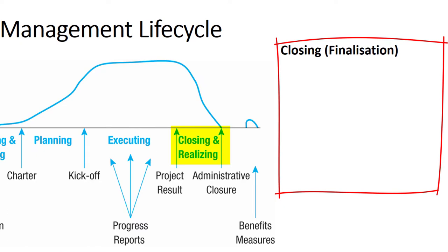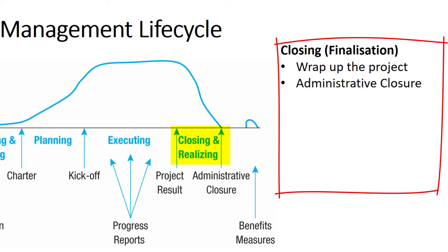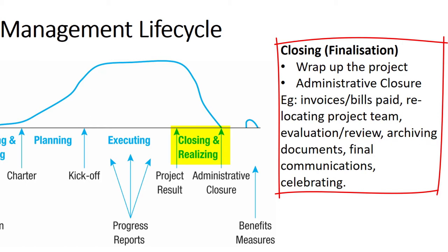This stage can also be called finalisation. Once the client has signed off that the project has been delivered to expectations or other specific success criteria, the project manager closes off the project. It's now time to wrap up the final components, which could involve tasks to bring about administrative closure, such as ensuring all final bills or invoices are paid, relocating project team members to other areas of the organisation or new projects, conducting evaluation and review activities, and archiving documents and other records.